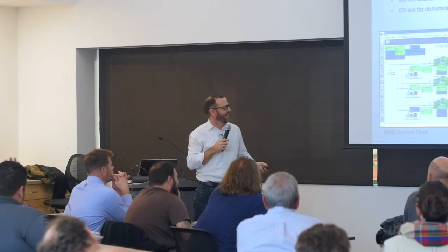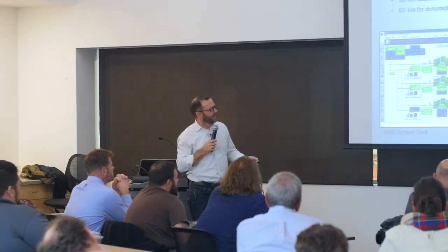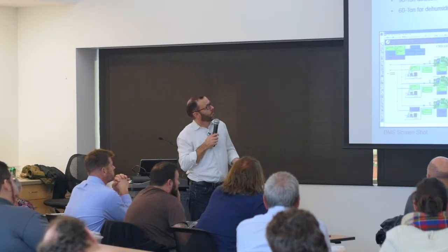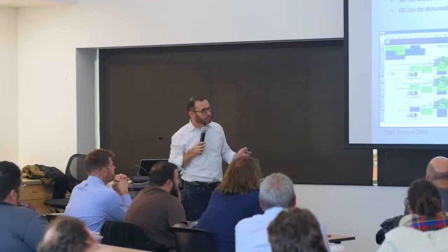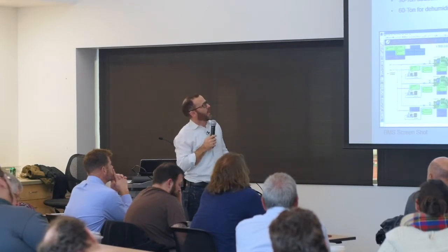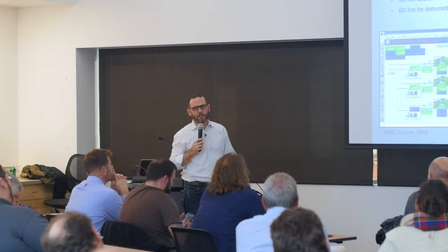It was funny. It took a lot of commissioning to get everything to work right, and you'd have circuit setter valves downstream of VFDs, like right downstream. And why would you do that? I don't know. Anyways, we also added a couple other chillers while I was there. One of them was a 90-ton that was dedicated for a smaller tank for the aquarium. So we set that one up to go extra cold. Although I wanted to put in glycol, I got back from aquarium management that glycol can kill fish if it leaks into the tanks, so we had to do our best with straight water.